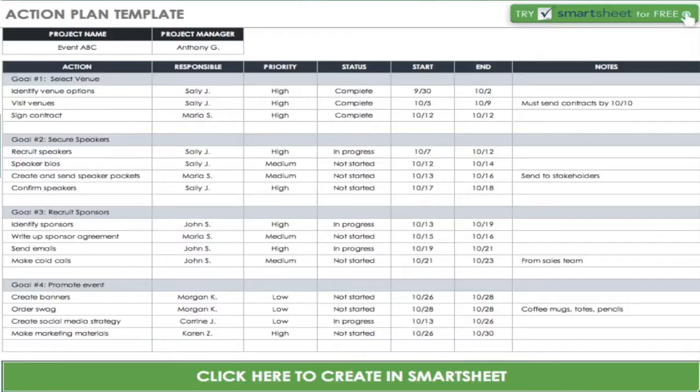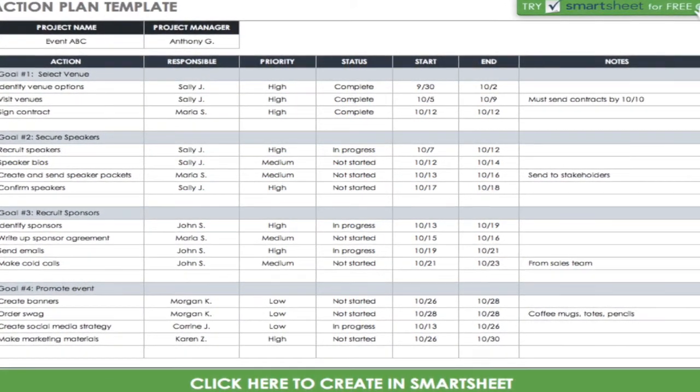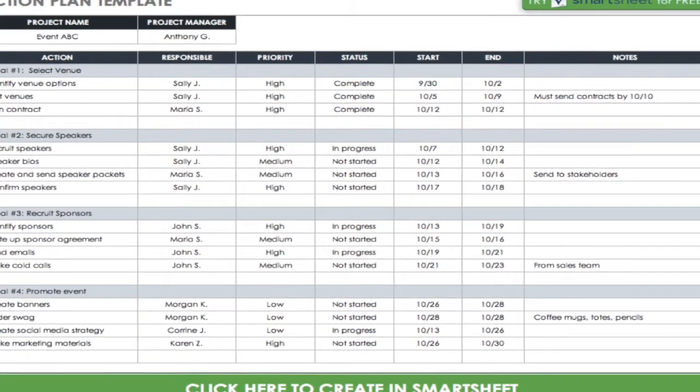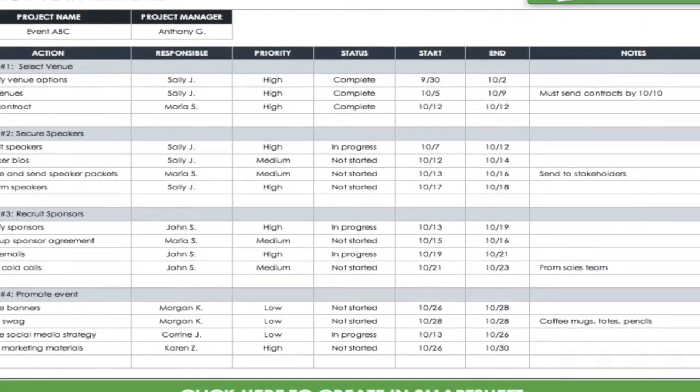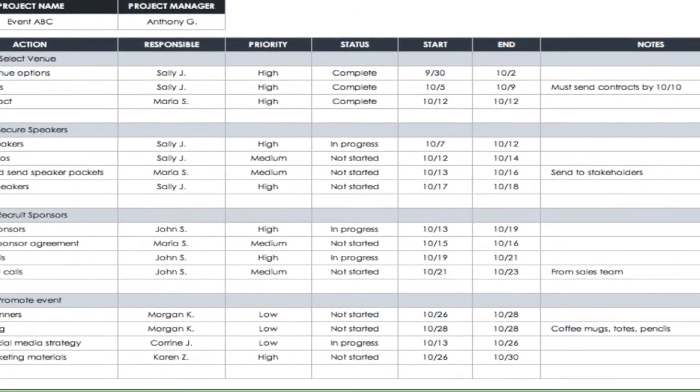As you can see in this action plan provided in the module, you have different goals, and this one is specifically looking at an event. So you have selecting a venue, identifying venue options, visiting the venue, signing a contract. Then you have other goals underneath, like securing speakers, recruiting sponsors, and promoting the event. The action is divided by different goals and tasks to be completed, and then you have a column showing who is responsible. Usually at the top you have the project manager, responsible for making sure everybody is doing what they should. This person also convenes the meetings just to check in on what has been done.